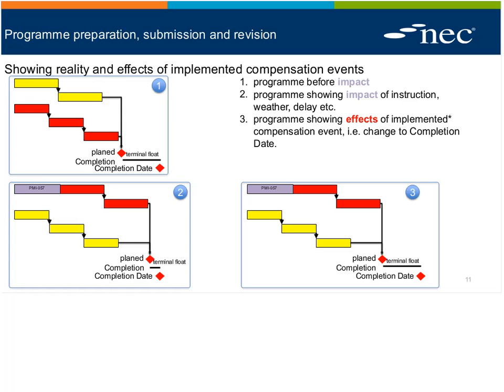The contractor is not in control of the completion date. No, he's not. It's arguable. It actually could be through the deemed acceptance process in compensation, but that's a circumstance for another day. But in the first instance, where he believes the project manager will respond in a timely fashion, the contractor should not change the completion date, either on the program or on the quotation. He should just be asking for change in plan completion, effectively.